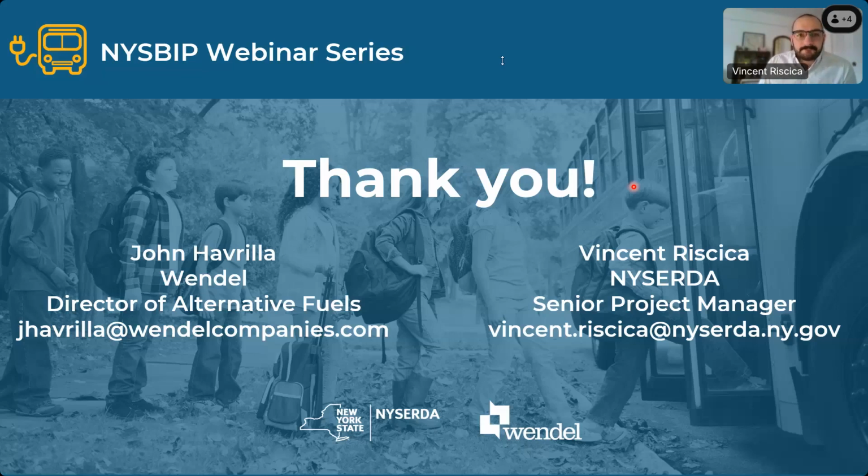What I would add to that, Vinny, is when you're looking at your FEP, your plan, understanding how much capacity you have in your existing service is important, because that can determine how many buses you may be able to do prior to upgrading the utility and putting in all this electrical infrastructure. So yes. In the case of Sweet Home, we can easily handle 3 buses. They get much beyond that, then they're going to have to start implementing phase 1, which is a significant capital project.